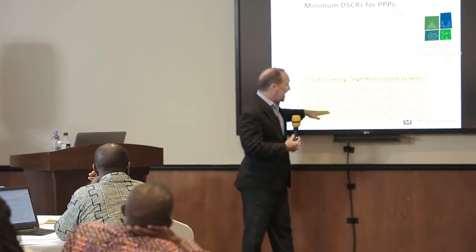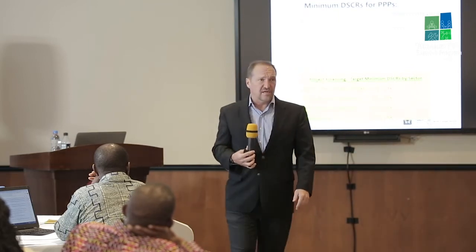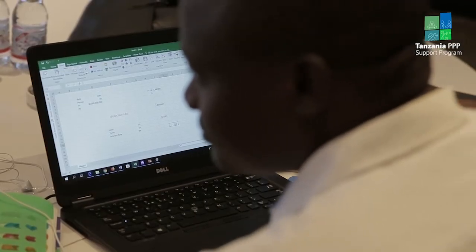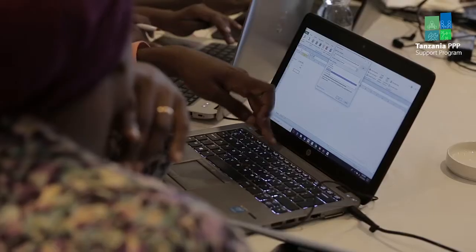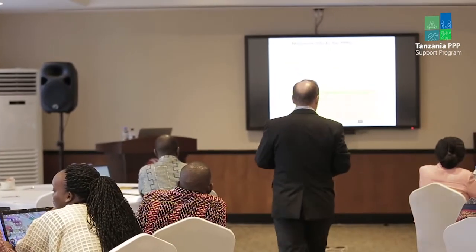We see that in the IT sector, you don't see a lot of project financings in this sector, but in the IT sector, there's a higher minimum debt service coverage. What do you know about the IT sector? How does it sort of differ from something maybe like traditional fossil fuel power generation? Yeah, the technology gets obsolete earlier. Technology risk.